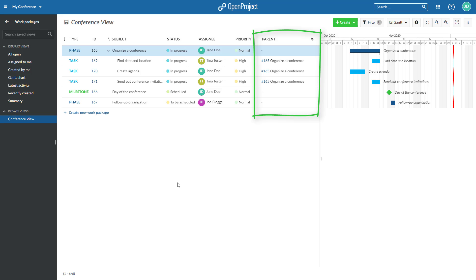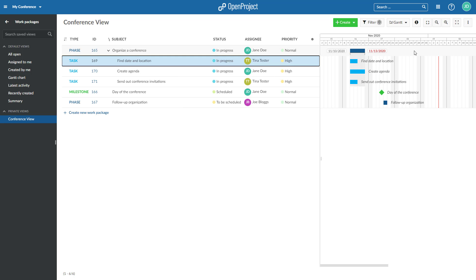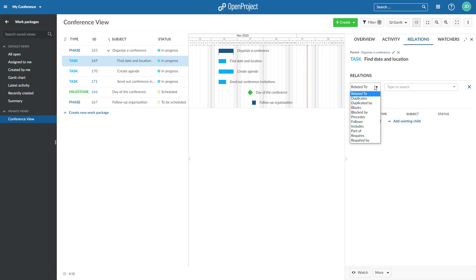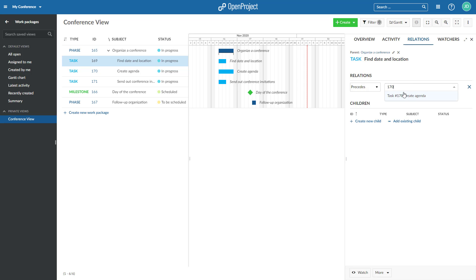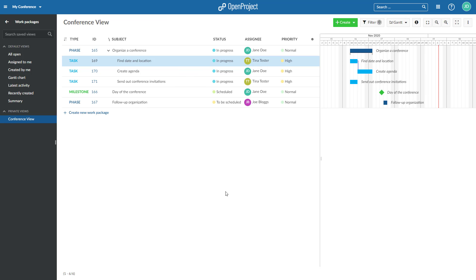The Follows and Proceeds relations define a chronological relation between two work packages. For example, if you set Work Package A to Proceed Work Package B, you will not be able to change the starting date of B to be earlier than the end date of A. Also, when you move the start or due date of A, the start and due date of B will be updated as well.